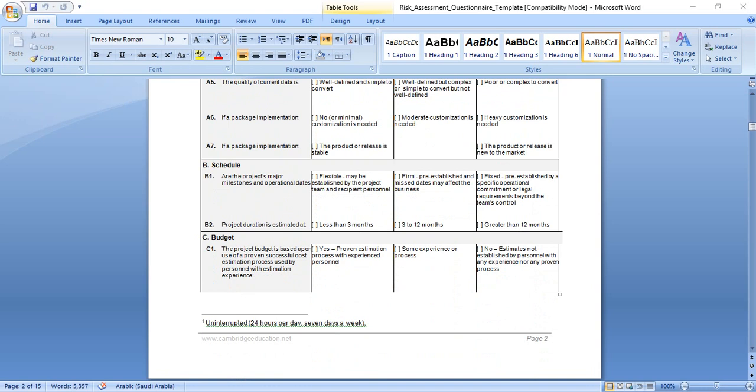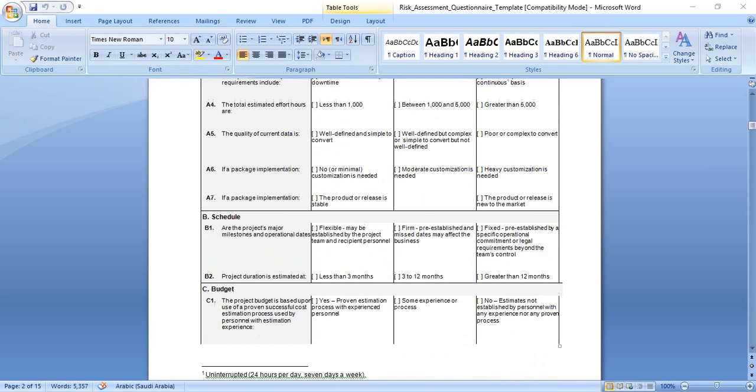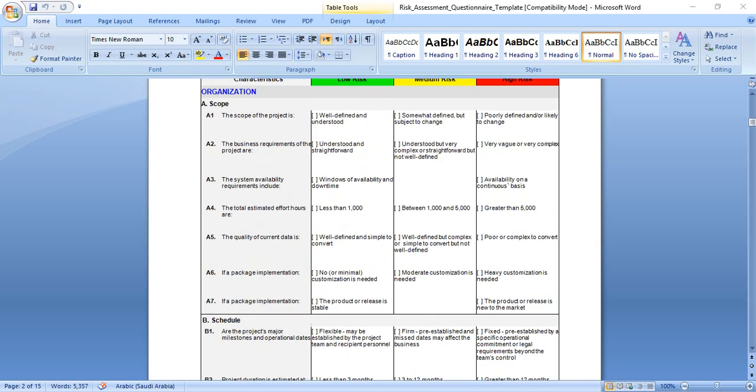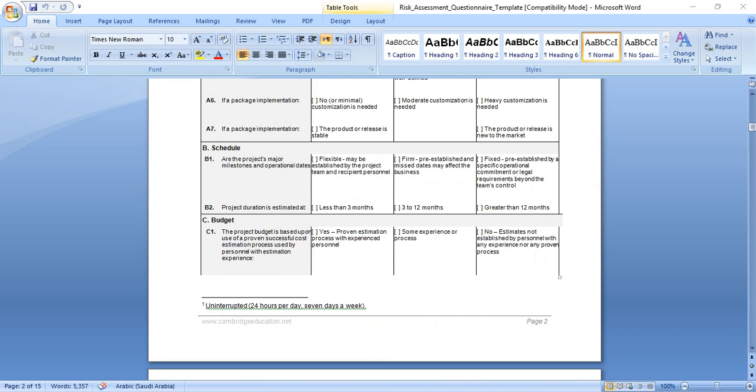If the package implementation requires no or minimal customization, this is low risk. Moderate customization is needed, medium risk. Heavy customization is needed, this means higher risk. So every item, if it's going to be complex or huge or heavy, this means it generates more risk. If the project is smaller, simpler, and well defined, this means it will be low risk. In between, if you find understood but moderate customization is needed, this means medium risk.